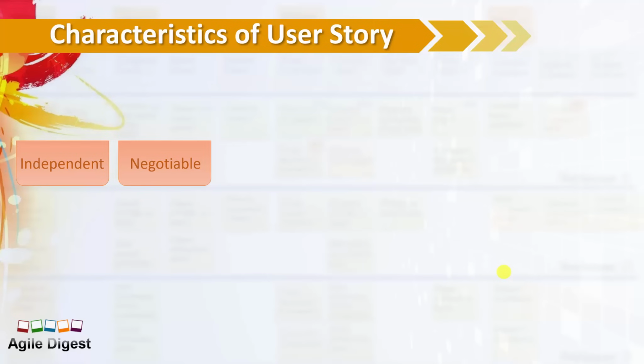What do we talk about as the definition of maturity? We need to create a definition of ready at some point, a checklist defined for this particular team, so that a story will be treated as ready if it meets these points. Now the next point, after independent and negotiable, we can have valuable and vertical.